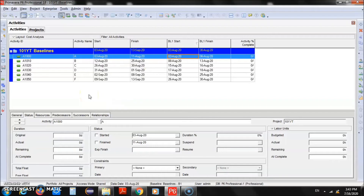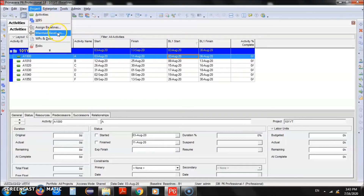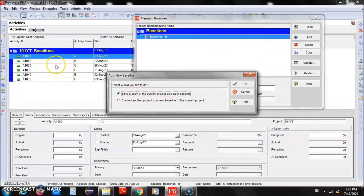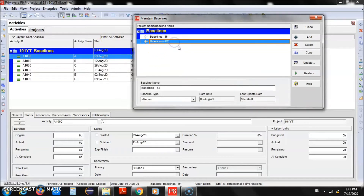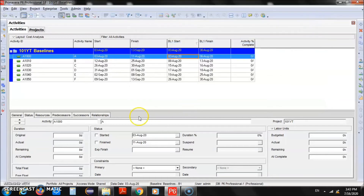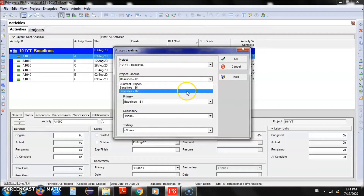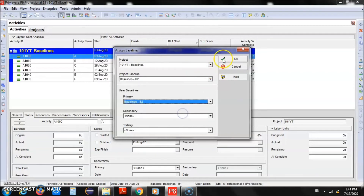Because we have made changes to the project, we need to update the baseline as well. We'll repeat both steps: go to Maintain Baseline, click Add, choose the first option, and click OK. Now we have B2. We have two baselines — B1 and B2. Close the window. Then go to Project, Assign Baseline, and instead of B1 we will now link B2. Click OK. Now the baseline dates have been updated.